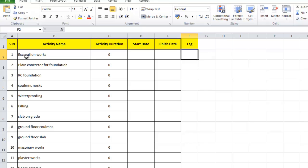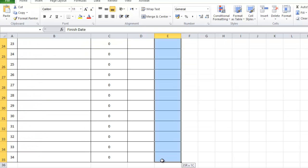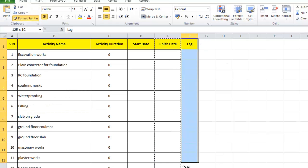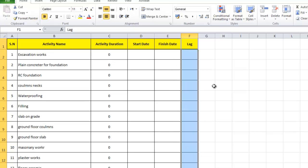For example, the completion of excavation will allow the start of plain concrete for foundation, but we need to wait 10 days — that's the lag. I'll select this column, click Format Painter, and apply the same format to the new lag column.